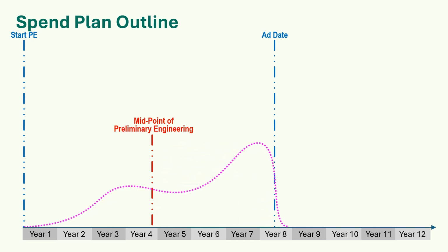Now focus on the right-of-way phase, which must be complete before advertisement, often 1 to 6 months before the ad date, and the phase may start a few years before that. Remember, even if your project doesn't require any property purchases, you likely will still need temporary construction easements, which can still take time. Ask the Real Estate Services Office for recommendations on this. The earlier you can start this phase, the better. But remember, you must have your right-of-way plan approved before you can start this phase.